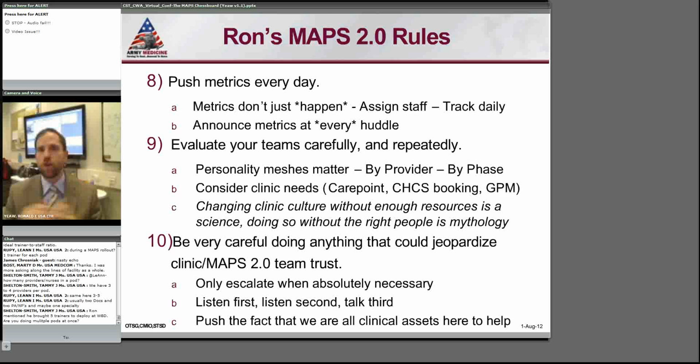When I pull together a MAPS 2.0 team, I look at a number of things, and it's not just who's available, but really about what are the skills I need. For this clinic, are they having problems with HEDIS? Then I need to bring a trainer who knows CarePoint. Did they get a brand new group practice manager? I need someone who understands metrics and PCMH and empanelment. Are they having problems with templating? Maybe I'll bring in a CHS booker.